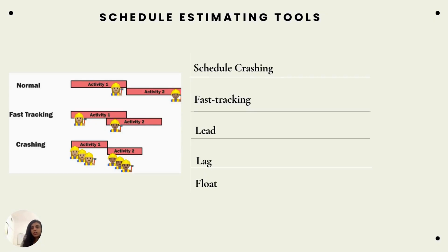Lag is the opposite. It is called wait time, where you have to wait for some time to elapse after the first activity for the successor activity to start. For example, in a construction project, you have to wait until the concrete foundation has dried up.